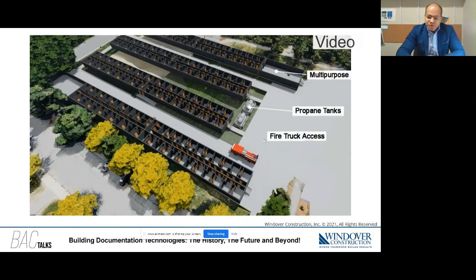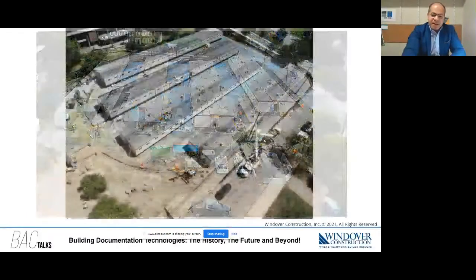It was done in 2 months to get a permit from the fire chief. The fire chief sees the animation, which is on a drone map site. They say, oh, my fire trucks can go in in an emergency very smoothly. So they approved really working on 2 towns. This project on 2 towns. So laser scanning and drone mapping really helped expedite processes like that.